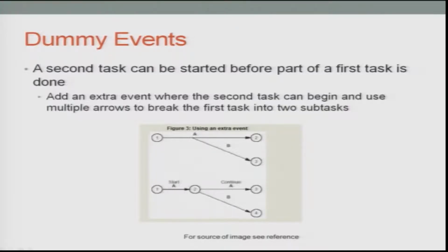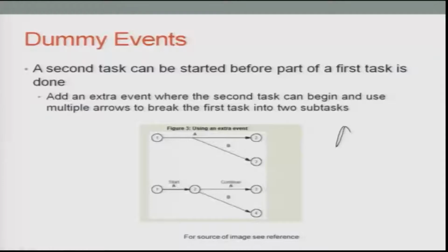You start, you go to stage 2 or node 2, and from node 2 you branch on further, for A to continue and B to take you from node 2 to 4. So, more levels of sophistication can be added, and you can draw the overall precedence diagram using the activity on arc or activity on node concept.